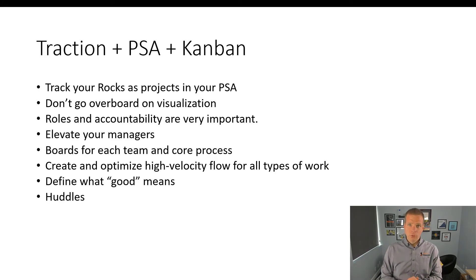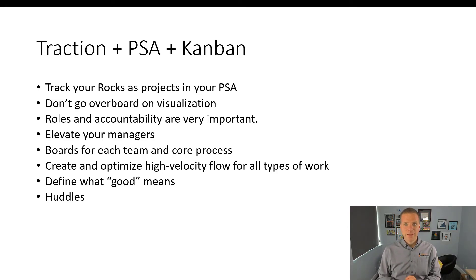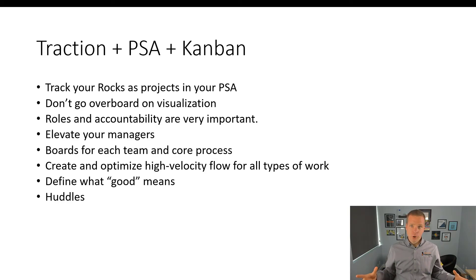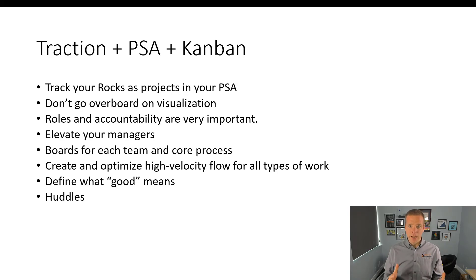Huddles are a key part of lean, Kanban thinking — the Traction book doesn't really get into daily huddles, but we have blog posts on how to run an effective daily huddle. Two years ago we had a 65-inch LCD screen in our huddle area in the office. Now, because we've grown and gone remote, it's all online by team — groups of seven or eight people max getting on a Zoom or Teams call, some just on Slack, reporting on what they're stuck on, what they did yesterday, and what they're doing today.